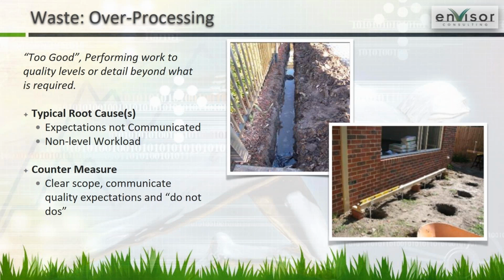I know that I have dug a hole before, a receiving hole for a tree, and then looked at the hole and kind of rounded it out with a shovel and made sure the edges are nice and smooth, and it's a good looking hole. And that's over processing. It doesn't really matter. The tree doesn't care. Nobody's ever going to see that hole but me after the tree goes in. In fact, as soon as the tree gets planted, the hole will cease to exist and never exist again. So it only needs to be deep enough and wide enough. It doesn't have to be pretty, and making it pretty is over processing.